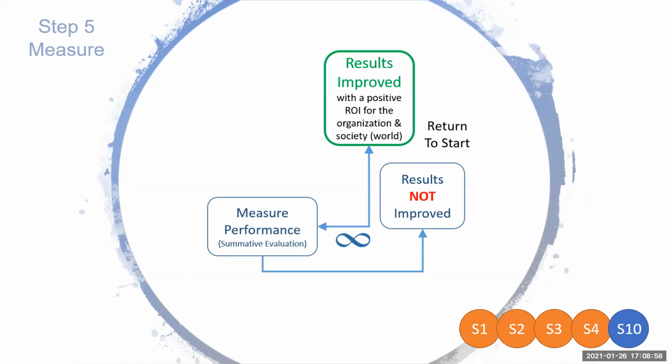And we did a costing, and the cost part is a little different because it was a military organization. So normally employee salaries don't get figured into things, but we did the tough homework to figure out what all those costs would be, including facility costs and the computers and the software and everything. And then we went out to industry and said, how much would you charge us to do a project of this scope? And we got quotes from 3 different big military contractors, and it was 2 to 5 times higher than what it had cost us to do it. So we were able to show a cost savings. We were able to show that we could do it fast, within 6 months, so half the time.